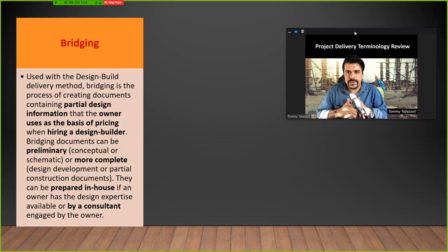Bridging, if you remember, in design bid delivery method, the owner's control over the design process could be compromised because both design and construction are being performed by the same firm. So in order to provide some guidelines or a corridor to move in for the designers, the owner would provide a bridging document. It includes partial design information, and the owner will actually use it as a basis of pricing.